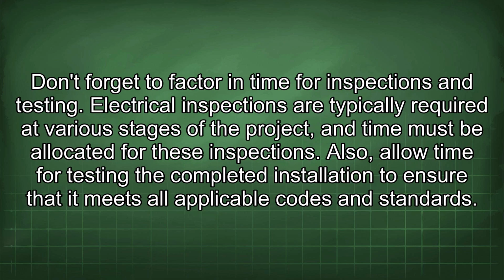Don't forget to factor in time for inspections and testing. Electrical inspections are typically required at various stages of the project, and time must be allocated for these inspections. Also, allow time for testing the completed installation to ensure that it meets all applicable codes and standards.